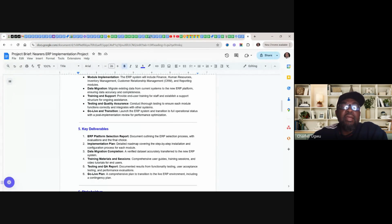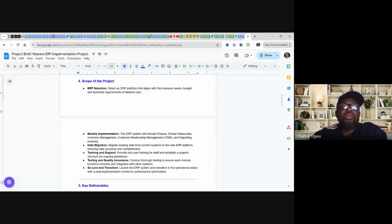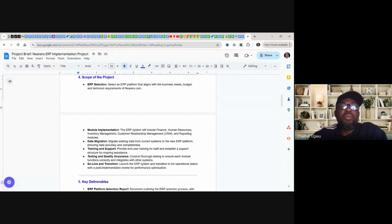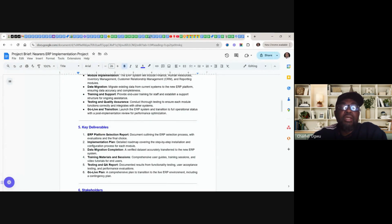These are the key deliverables, just like what we captured in our scope. We almost captured the key deliverables in our scope. We have ERP platform selection reports. So when this is done, what we mean by within our scope, we have all this in our scope. So the key deliverable should be a report about the selection of this ERP. So we need to do a very good requirement gathering and analysis,